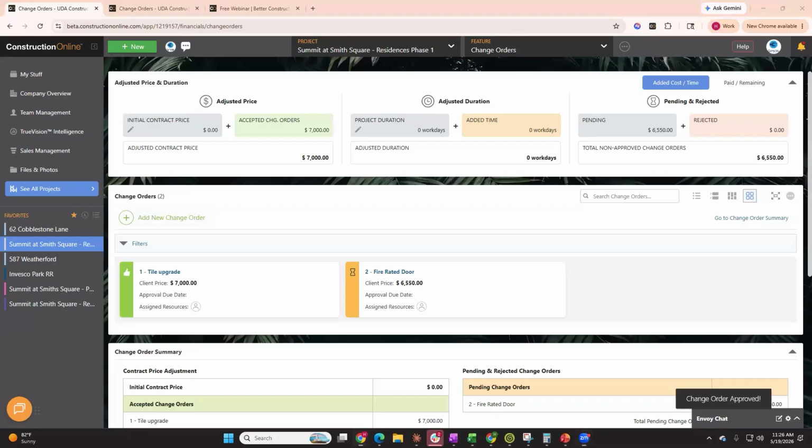So let's say we ordered today. We have an expected shipping date of this Friday. We can go ahead and plug that information in and save that. When you actually receive those, you can come back and mark that those items were delivered and document the date you actually received them. So you'll notice when I did that, my label here updated so that I can see quickly at a glance, as I'm looking at my change orders, which ones have been ordered, which ones have in fact been delivered. We're able to track that information very effectively here.